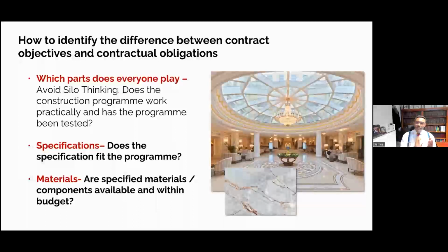They were coming behind the architectural design as well as the structural design. What then, of course, happened in that case was that the structure was being raised at a significant rate, only to find that when the M&E drawings came, it identified a substantial amount of services traversing both vertical and horizontally through walls and through floors, where the holes were not cast in.